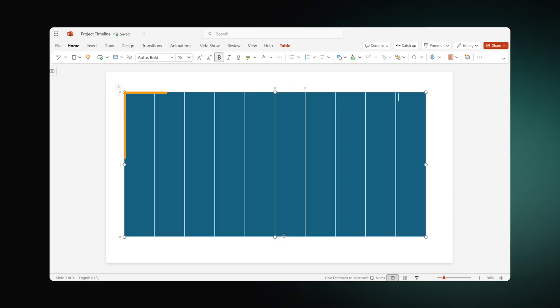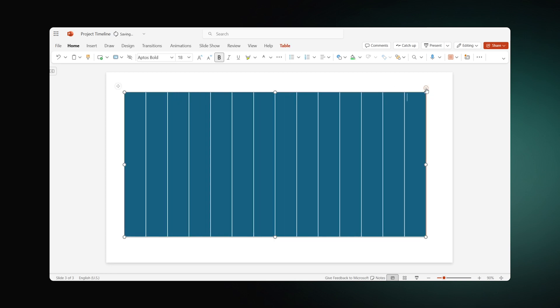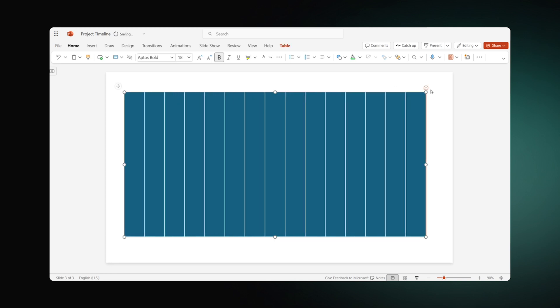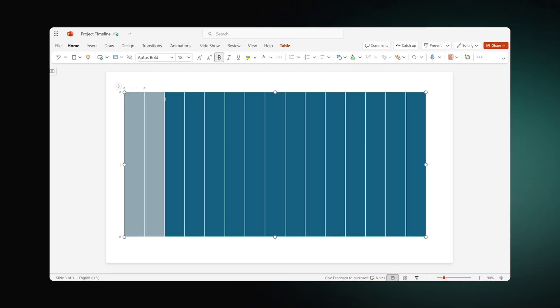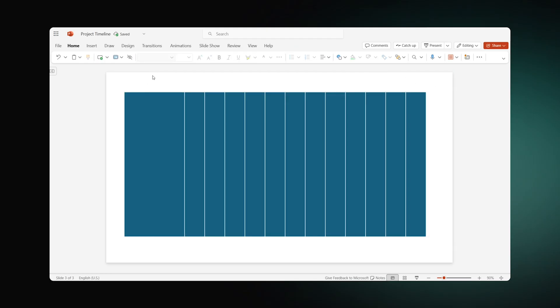The first three columns will be occupied with task titles. That is why we'll need to add five more to account for month names. To create a task name section, select the first three columns and click Merge in the top pane.